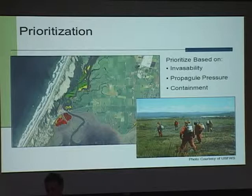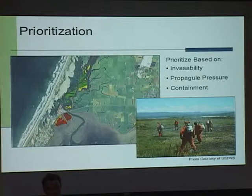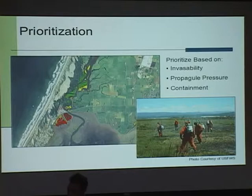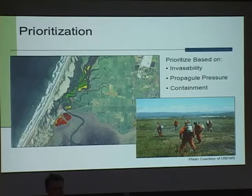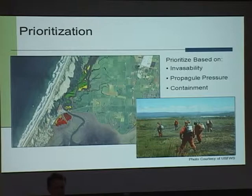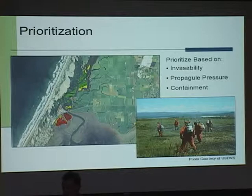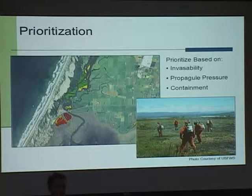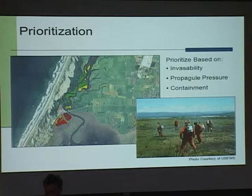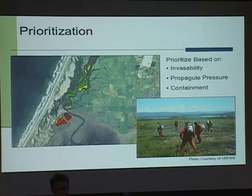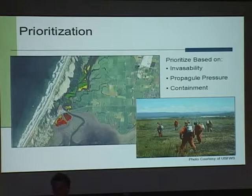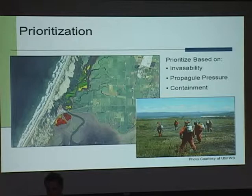There are three key parameters we've used to develop a prioritization decision-making framework. First is the invasibility of any site — how sensitive a given site is to being invaded by Spartina. Sites that have recently been treated have higher invasibility due to more bare ground, making them a higher priority. Second is propagule pressure — how much seed is likely to leave a site and reach another highly invasible site; higher seed contribution means higher priority. Third is containment: if significant containment has already been conducted at a site, we want to protect that investment, so higher existing containment also raises the priority.